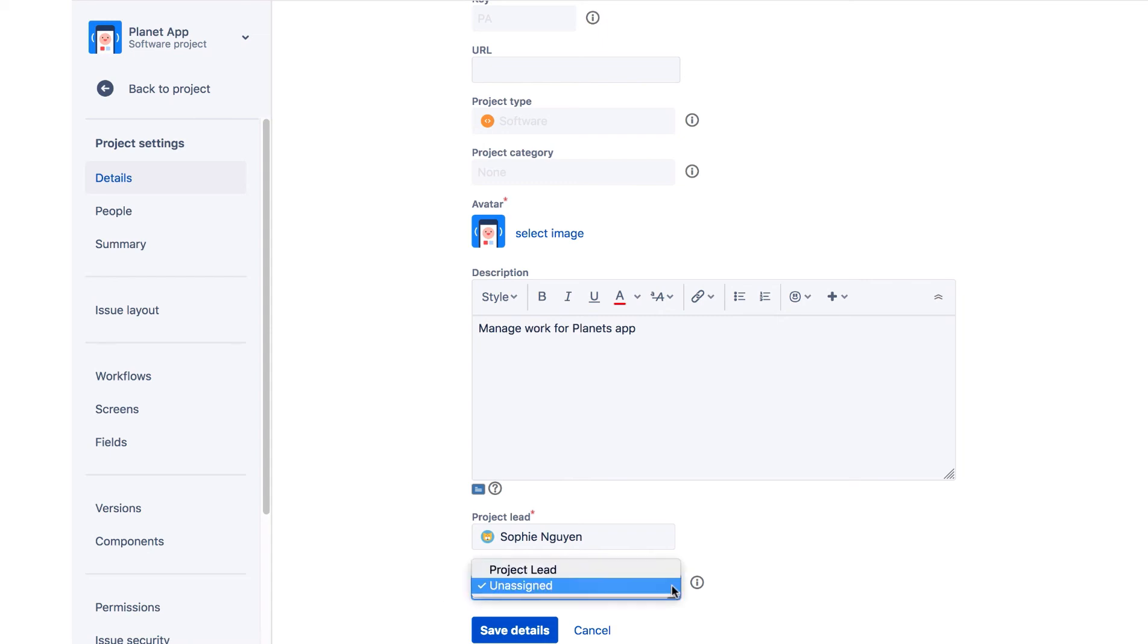You can either choose Project Lead or leave it as unassigned. Note the Unassigned option is only available if the Allow Unassigned Issues setting in JIRA's General Configuration is set to On. That's the default.